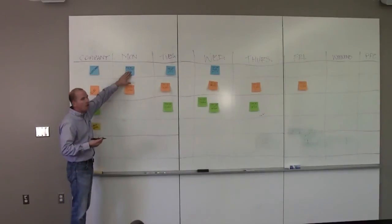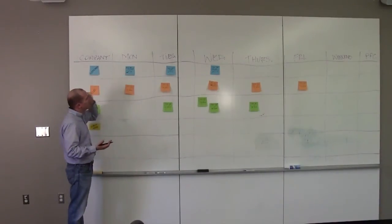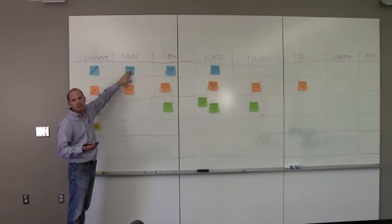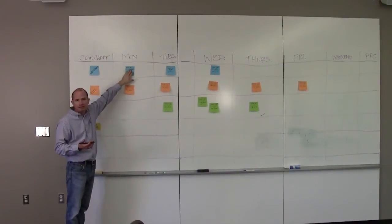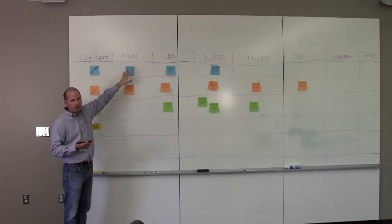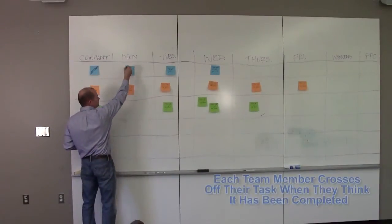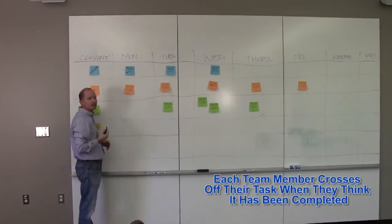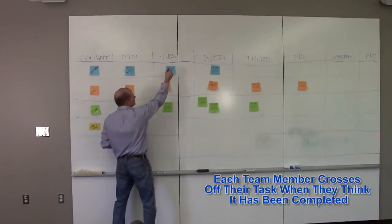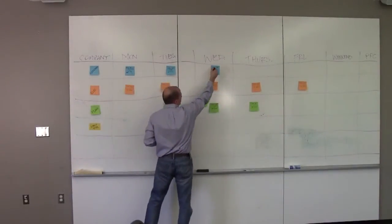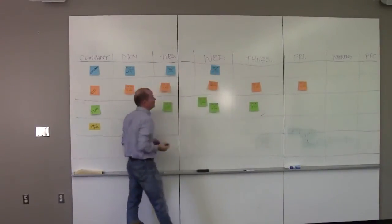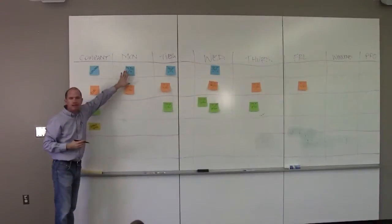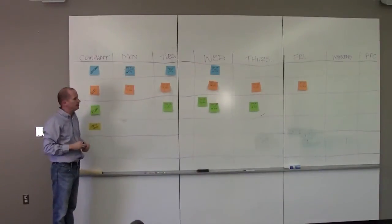So I'm going to be acting as the general contractor and say I'm checking their work because the next task in line is them, the concrete guys, installing the rebar. So I would go through and say yes, we did install there, there, and there. So that is done. There's an X there. We know that is completely done.